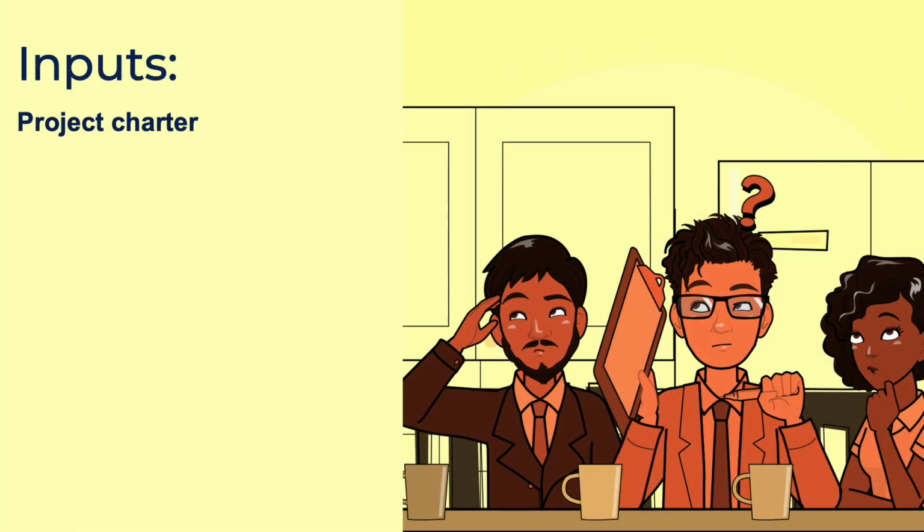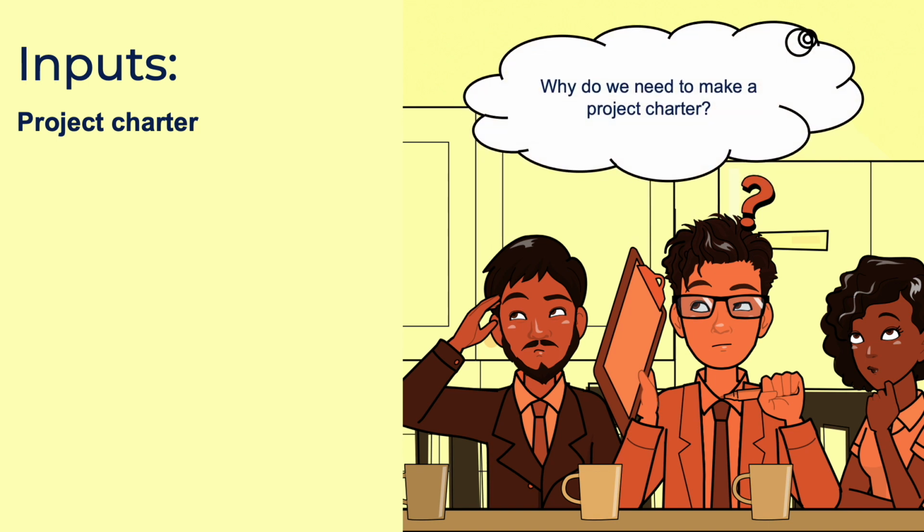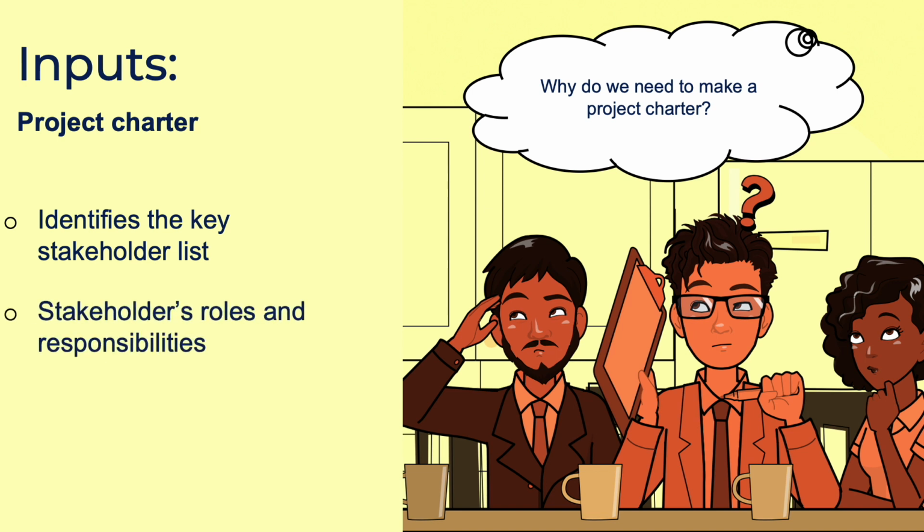And one input to planning is the project charter. Now, why do we need one? Well, it identifies the key stakeholder list containing information about the roles and responsibilities of the stakeholders. If you know who your stakeholders are and what they do, you'll be much more prepared in what information you want to communicate.